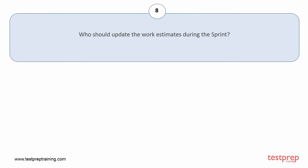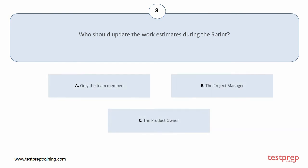Question number 8: Who should update the work estimates during the sprint? Your options are: A, only the team members; B, the project manager; C, the product owner. The correct answer is option A.